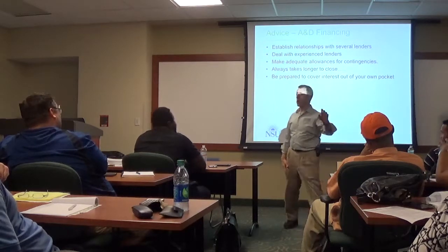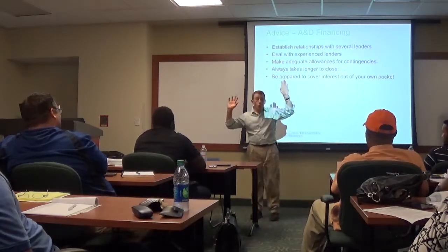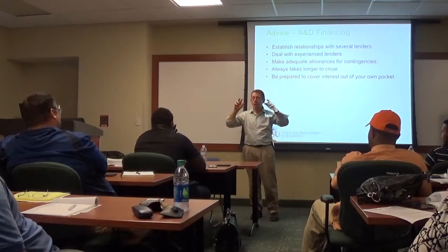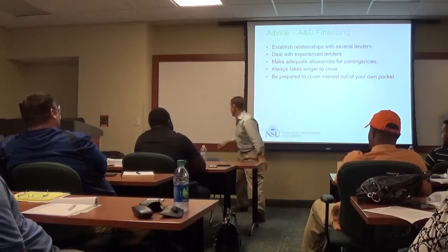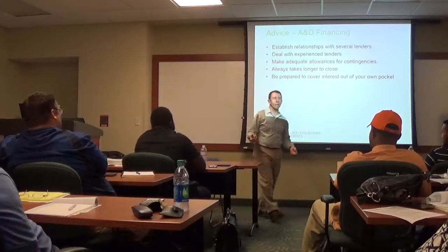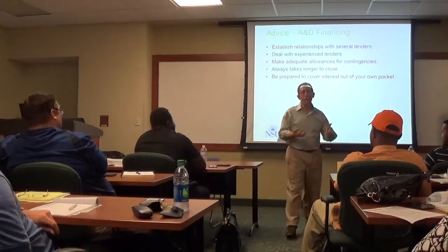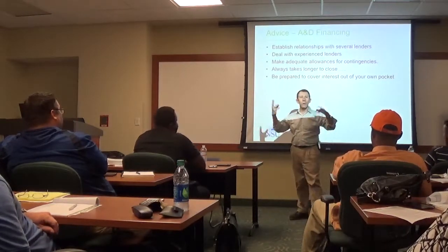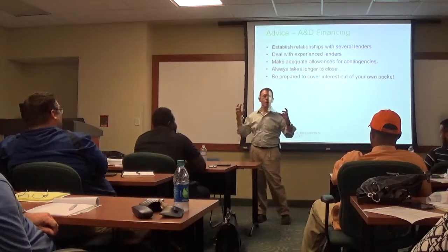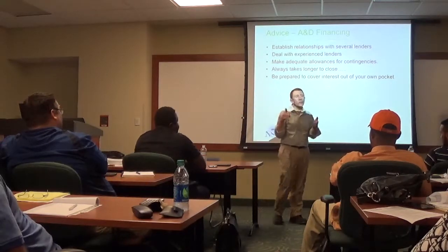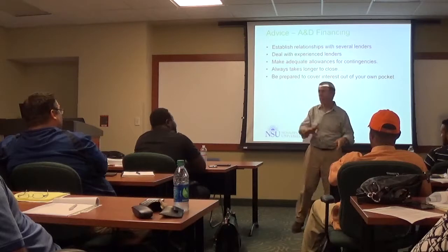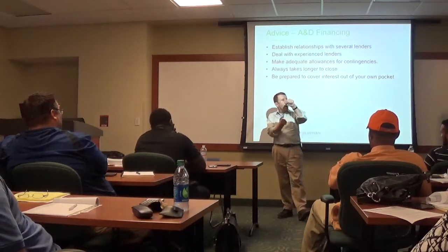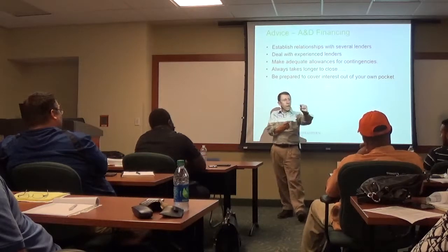Yeah, so what Carol's talking about, does everybody know what soft costs are? Soft costs as opposed to hard costs. Hard is the actual buildings you own. And the soft is the engineer, the architect, the legal, the environmental consultant, the zoning counsel. Those are the costs that basically help you to get the building built. You add the two together, and it's your total construction budget along with your contingency and your developer's fee. If you recall from the Styles budget today, they had their own development fee in there.